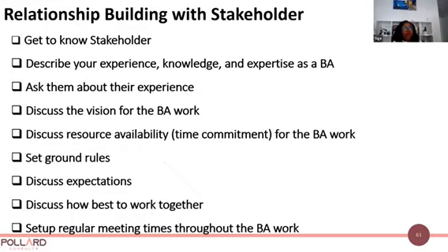Again, part of the discussion, one of the things I ask them is what their availability is like. Their managers might tell them they are assigned to this project, but in truth they don't really have availability. Nobody's taking work off their plate, but other work is being piled onto it. So if they are sincere enough to tell you what their availability is like, you can know that it might be a risk to your project, because they are telling you, oh, I'm busy, I'm not available, which might be different from what their manager is saying.